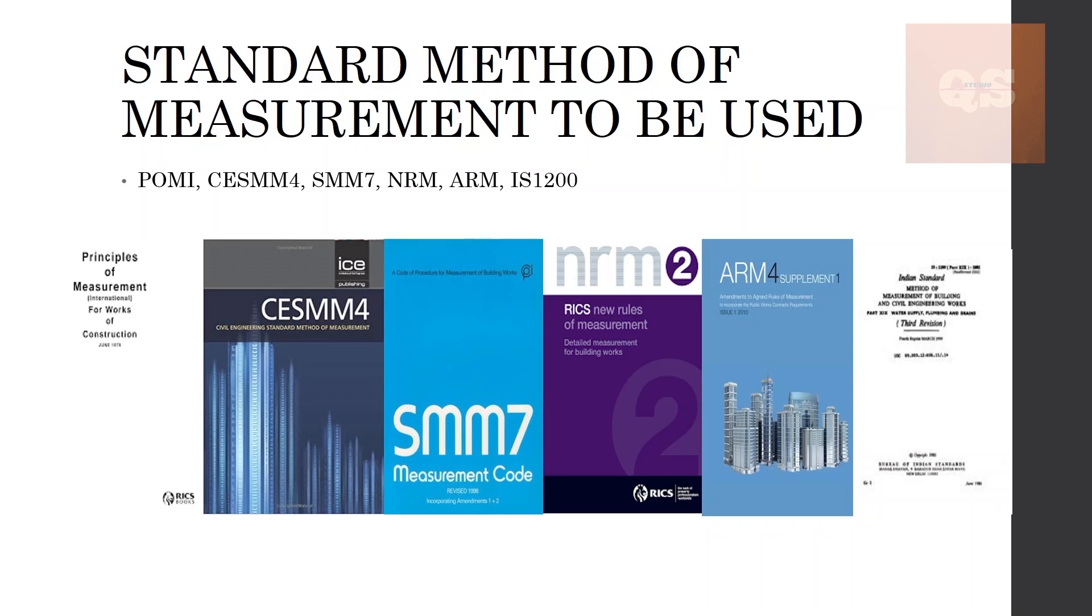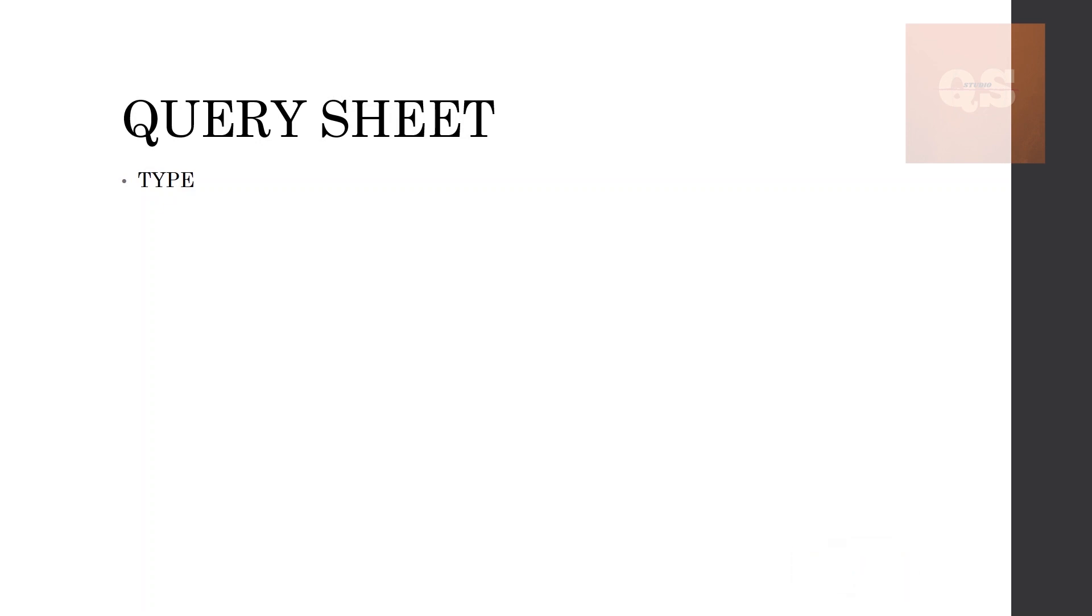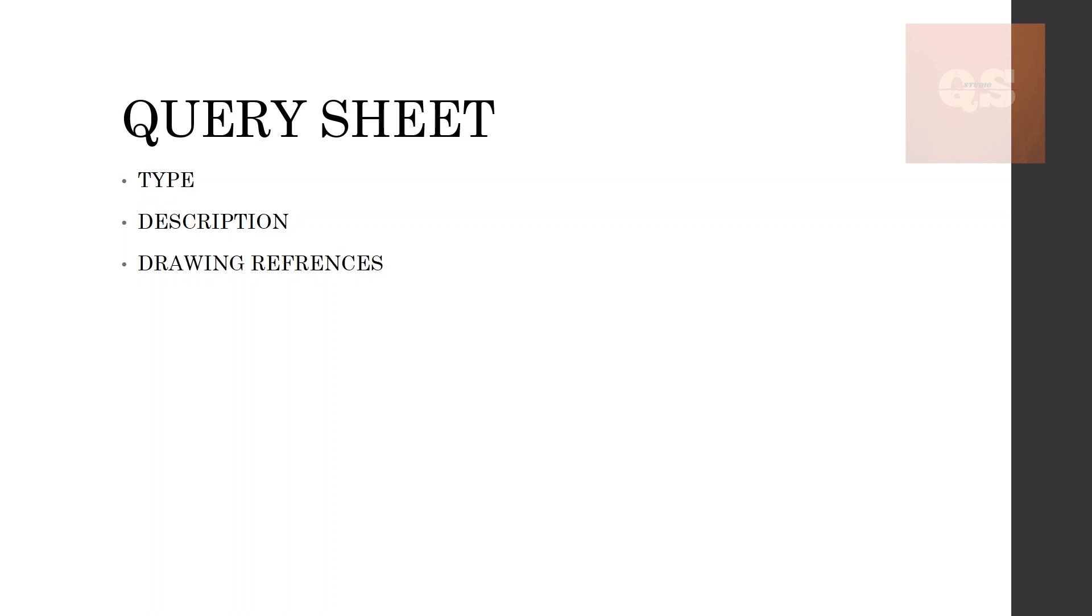All these queries need to be put up in the query sheet. Once you receive all your documents and the client asks you to start your project, you will have to put up all your queries under a query sheet. It will basically contain following headings like the type of query—whether it is a document or technical related query, or if it is a document missing, or if it is a scope related query. Then a detailed description of that query—whether this drawing number is missing or this technical detail, the dimension of the pipe is not mentioned, or this riser or schematic drawing is not available. All that detailed description needs to be put under the description column.